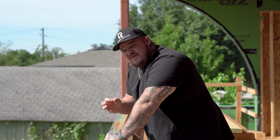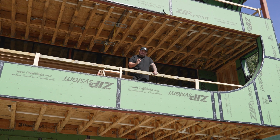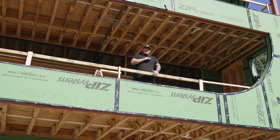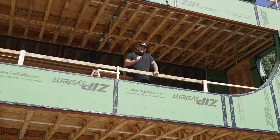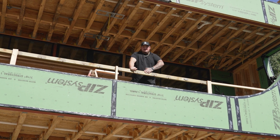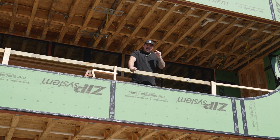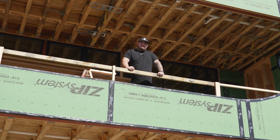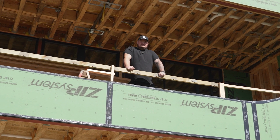That's a $25,000 lesson that I learned. But guess what? From this point forward, I don't care if it's my freaking brother. I am not advancing anyone on work that has not been completed. If the work has been done, I'll pay you $1 million if that's what it costs. But do not ever advance that money, because guess what? You lose all your leverage, and 99% of the time, it's gonna bite you in the ass.